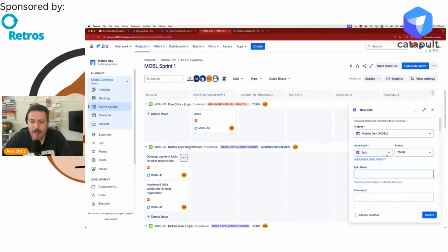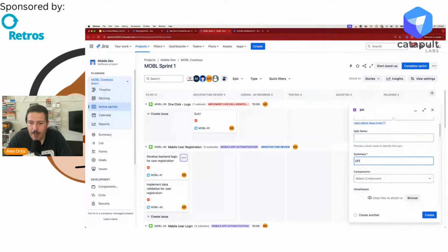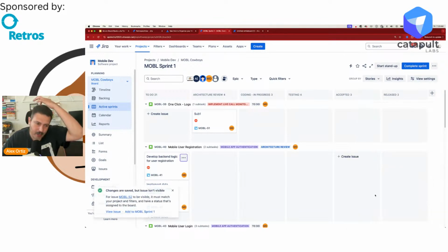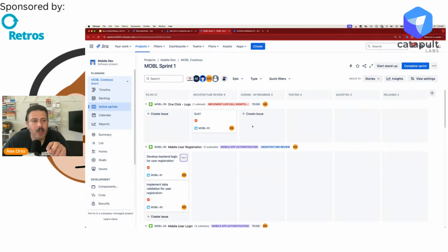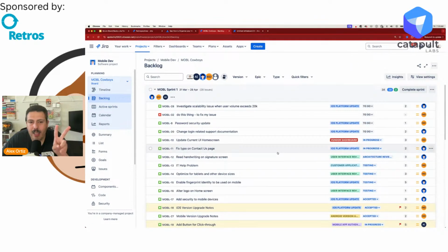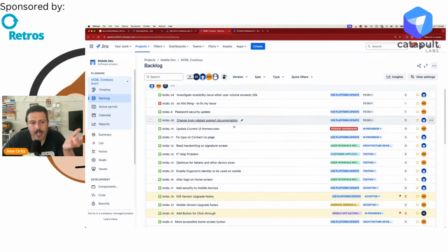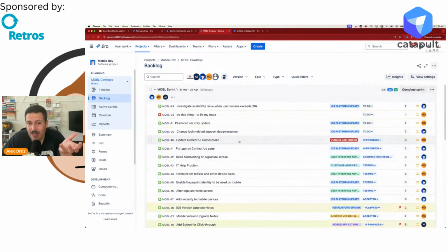So if I create an epic here, so I'm going to create this epic for class, okay? I'm just going to create this epic here. When I create this epic, you're not going to see the epic in the board, right? So the epic will not be shown in the board. That's rule number one. Rule number two, the epic will not be visible in the backlog, okay? And so you can look through here. Oh boy, I really got to turn that feature off, right? But as you look through here, you're going to see that our epic that we just created isn't visible.